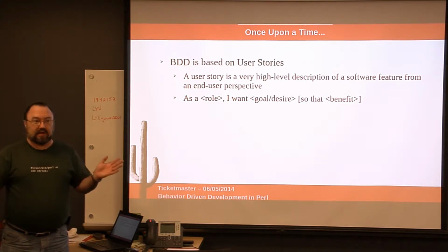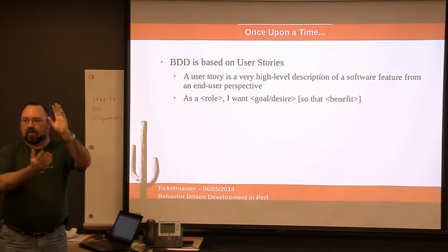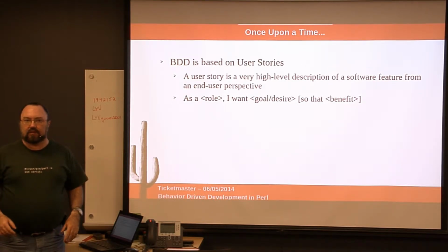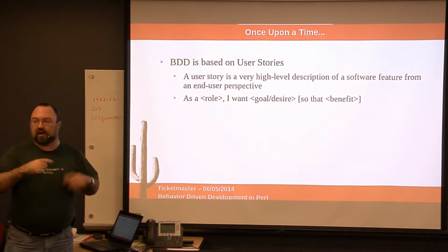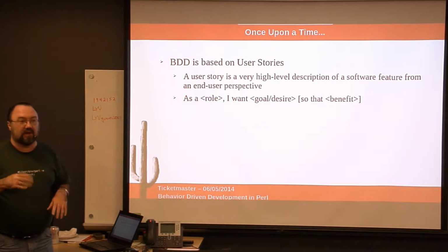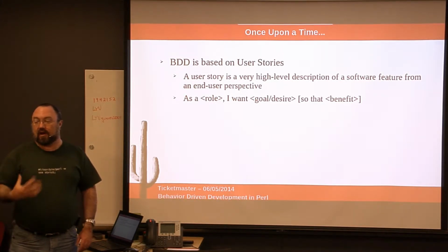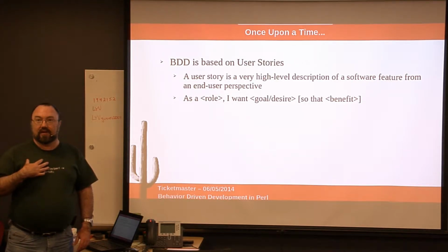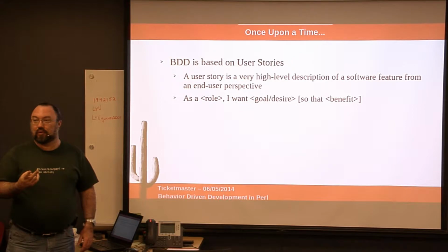We get to decide as the developers, well, this is how much we can get done off your list. So he or she is the one who gets to decide what the priorities are and all of that stuff. We get to decide, though, how much we think we can actually accomplish. So it's not like the deadline's already known. We've got 2 weeks to work on it.